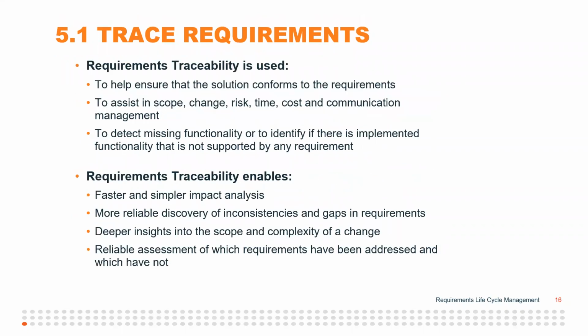So, requirements traceability: part of the purpose of it is to help ensure that the solution actually conforms to the requirements, and to assist in scope, change, risk, time, cost, and communication management. It also detects possible gaps in functionality, or implemented functionality that isn't supported by any requirements. So why is it there? You may need to remove it because it's not needed.